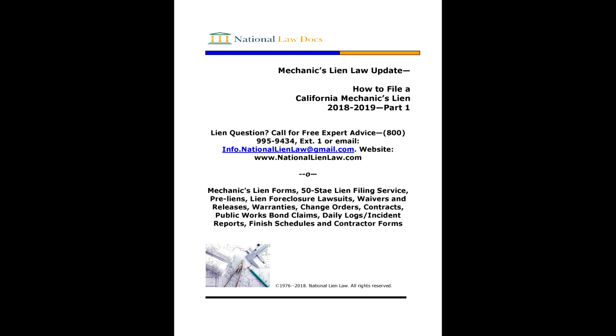In the United States, mechanics liens go back to 1791 in the state of Maryland, which was given to contractors to ensure they were paid in building the capital city of Washington, D.C. From the beginning, they constituted a lien on the property, just like a mortgage. The effect is to prevent the sale or refinance of the property unless you are paid. So it's a very powerful device. But in exchange, the courts insist you follow the right procedures and record on time, or you lose those rights. For this reason, they are very picky as to the technicalities.